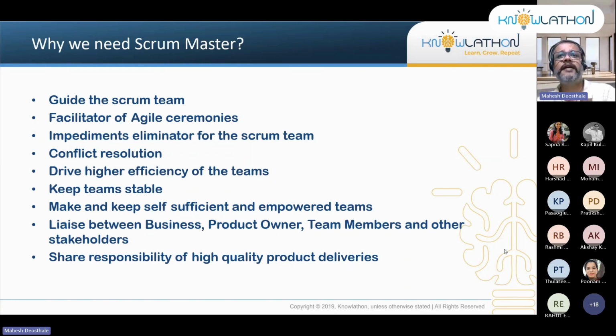For example, the estimations will be driven from the ground. The team members will do the estimation. Now, those who have a little background about Agile would know the terms like t-shirt sizing estimation or Fibonacci series based estimation. So the Scrum Master will ensure that every team member understands these different techniques, and then they will get the estimations from the teams, and the Scrum Master will ensure that within the practical range, these estimations will be respected by all the other stakeholders within the organization.